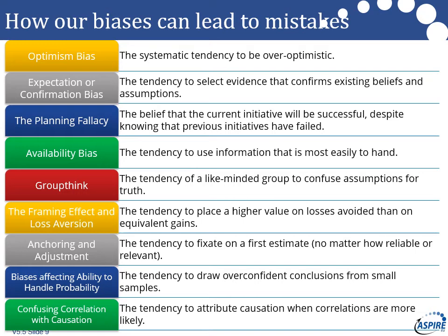And there's another angle on this in some ways, is that leaders want it done fast and cheap, so the people preparing the business cases produce one that's fast and cheap to keep them happy, and it could be the later generations that see the true cost of it. So optimism bias, and then we've got expectation or confirmation bias. So once you've actually got a belief that something should happen, we could look at High Speed 2 in the UK, or think about the COVID pandemic opening up. Once people get it in their heads that they want something to happen, they'll find the evidence to support it.